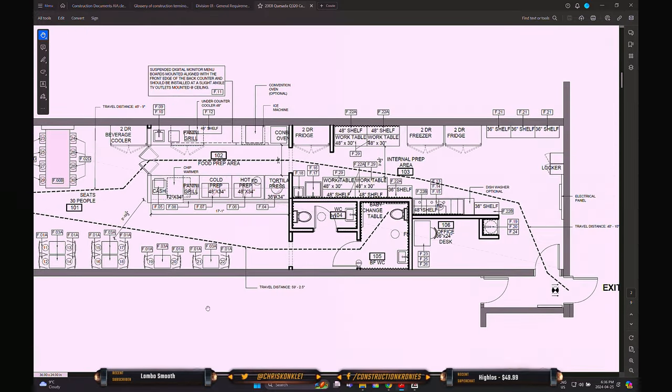And then this here, same thing. This is a glazing into the existing door. Like this is a door. It's an aluminum door, and there's a drywall return in the door as well, okay? That also is three sides. You've got tear away on the inside, corner bead on the outside. That's a lot of work to finish, okay? So, you know, you've got to price that accordingly.